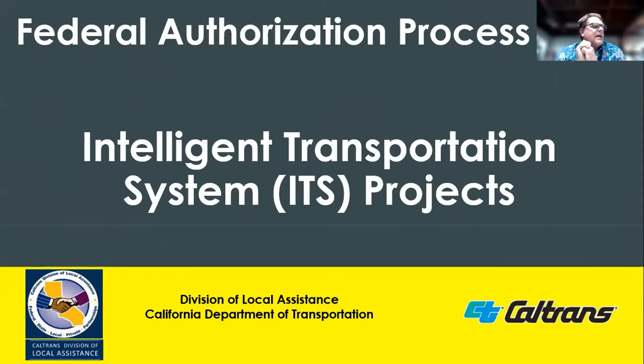The designing and development of ITS projects represents a paradigm shift in the engineering mindset compared to traditional highway projects. ITS projects may not have a clear break between the preliminary engineering phase and construction phase. These projects may not have a traditional construction phase and may not be suitable for low bid construction contracts. The nature of the engineering development of these projects also implies a greater risk of uncertainties for successful completion.